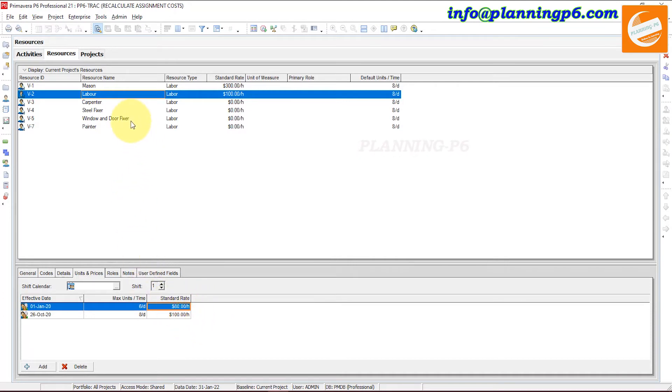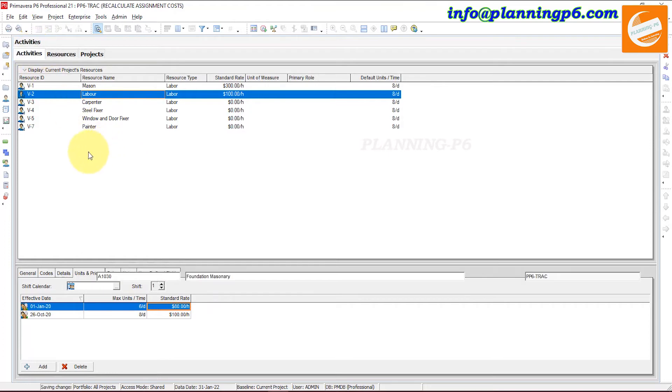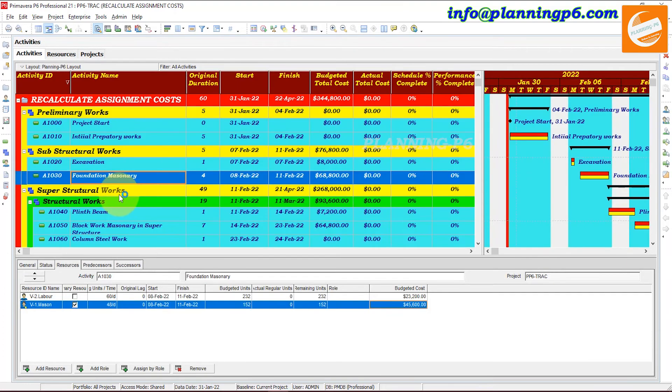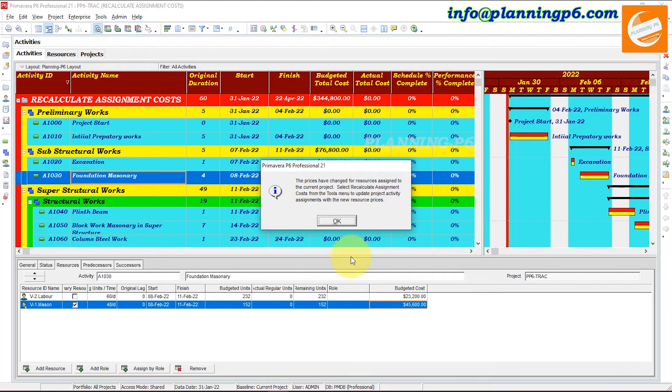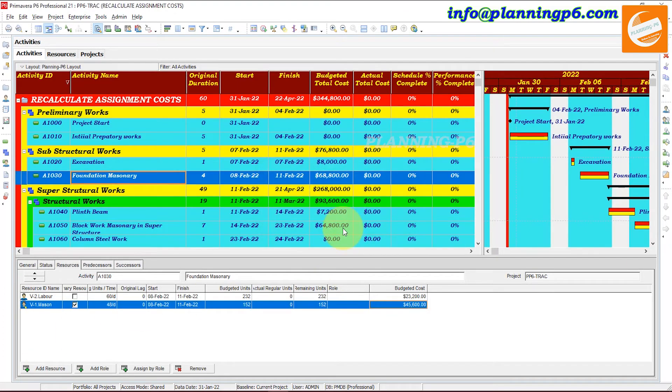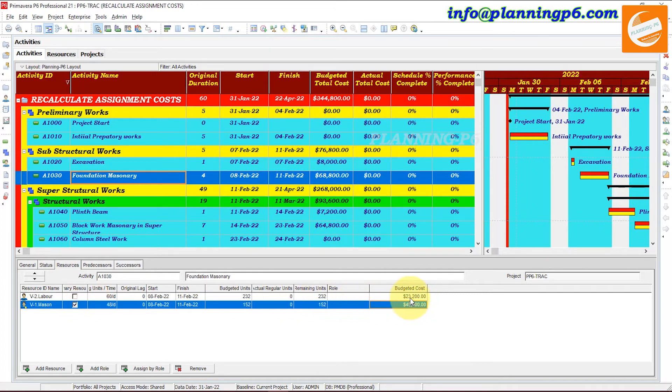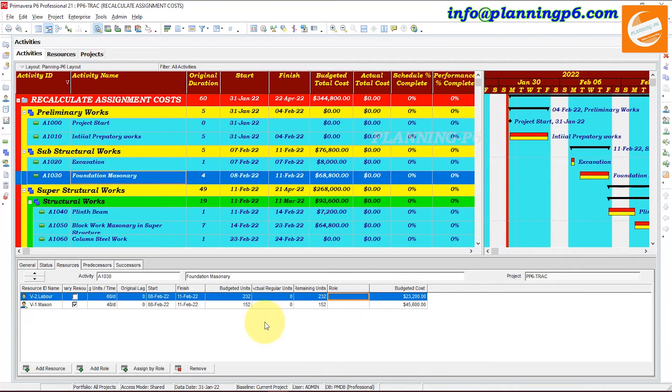Now go again to the activities and see where the labor is. OK, labor is also here. You can see the total cost for the labor is this one. And now we have to again, after changing the cost for any resource or role, you have to recalculate the assignment cost.